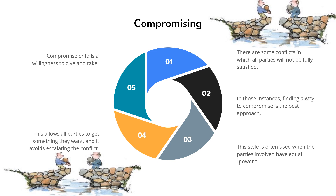Example 2: Project timeline. Imagine a project where the project sponsor expects an aggressive delivery timeline, while the project team is concerned that such a tight schedule might compromise quality. In a compromising approach, the project manager facilitates a conversation about requirements, risks, and constraints, ultimately agreeing on a slightly extended timeline that maintains a high standard of work while still delivering within a reasonable timeframe. Compromising is particularly useful when parties have relatively equal influence, requiring effective communication, a willingness to negotiate, and focus on achieving the project's objectives within stakeholder constraints.